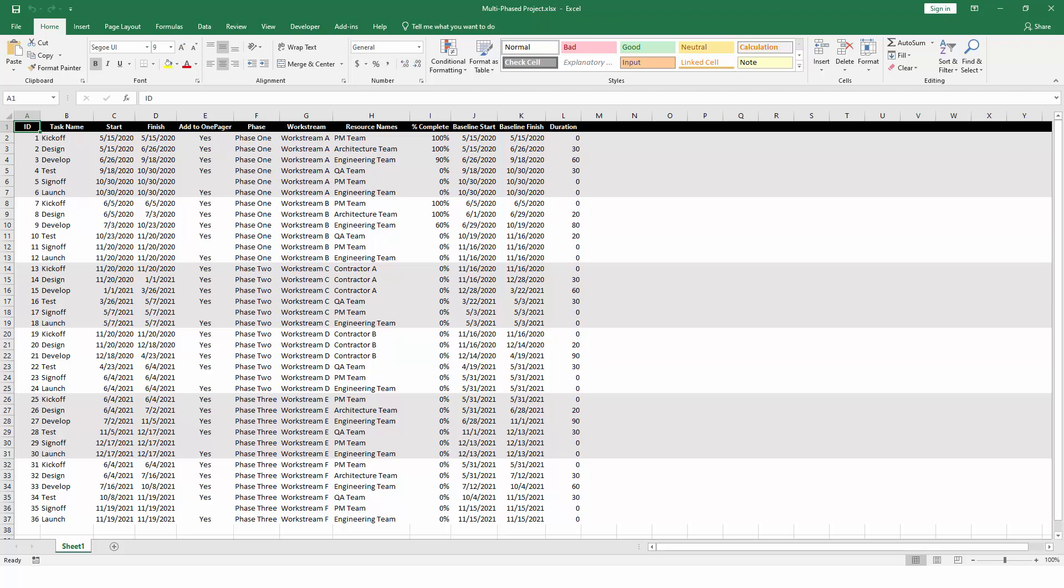OnePager is very flexible, and it can import various Excel layouts. Here we have a task name, a start date, and a finish date, and each task is listed in its own row in the Excel file. This is the basic layout that OnePager expects.